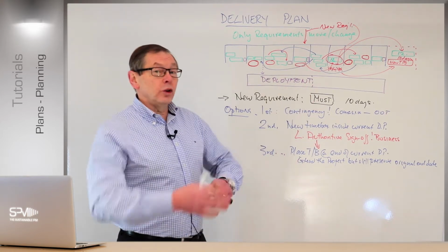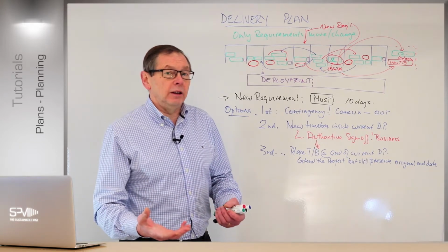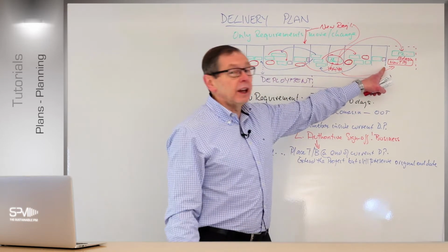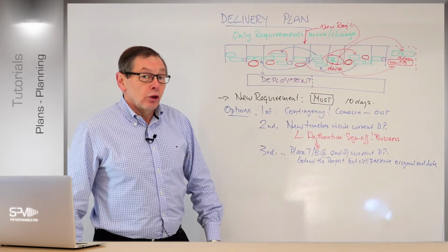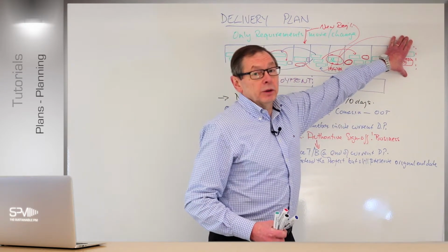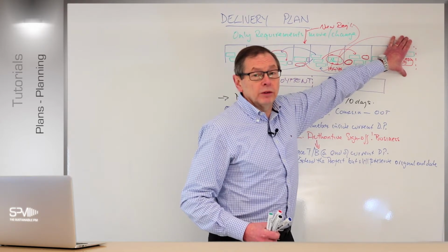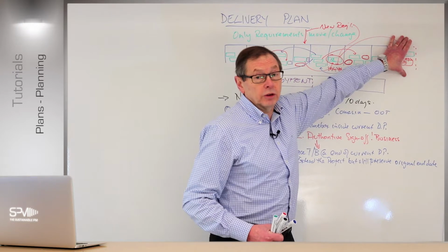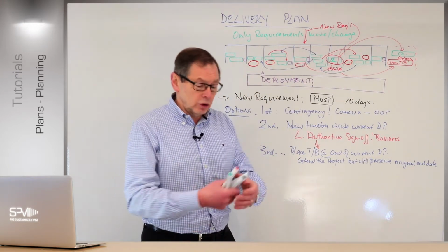Now, all we're doing now is really changing the real end date of the overall project to a certain extent, although we've still got an end date here from that part, and we do the resources page there. You could argue that they may say, don't bother with that at this particular date for the project. We can drop that out altogether and do that from a BAU point of view, business as usual, in an operational type change. It doesn't need it. The main framework of the project's up. So you've got that sort of option too.